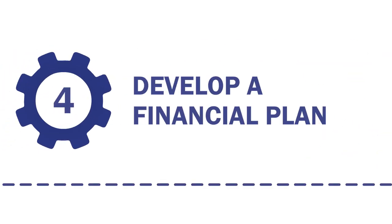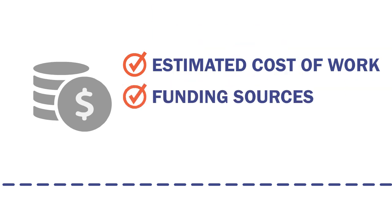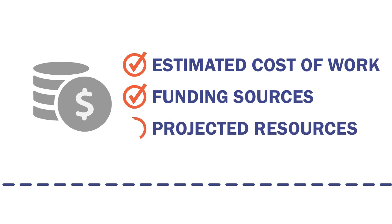4. Develop a financial plan that identifies annual costs, covering at least a 10-year period. This plan must identify the estimated cost of work to implement investment strategies in the TAMP, anticipated funding sources, and present a state DOT's estimate of projected available financial resources. This financial plan must also include an estimate of the value of these assets and the needed annual investments to maintain the value. A financial plan highlights how resources are expected to be allocated based on asset strategies, needs, shortfalls, and agency policies.